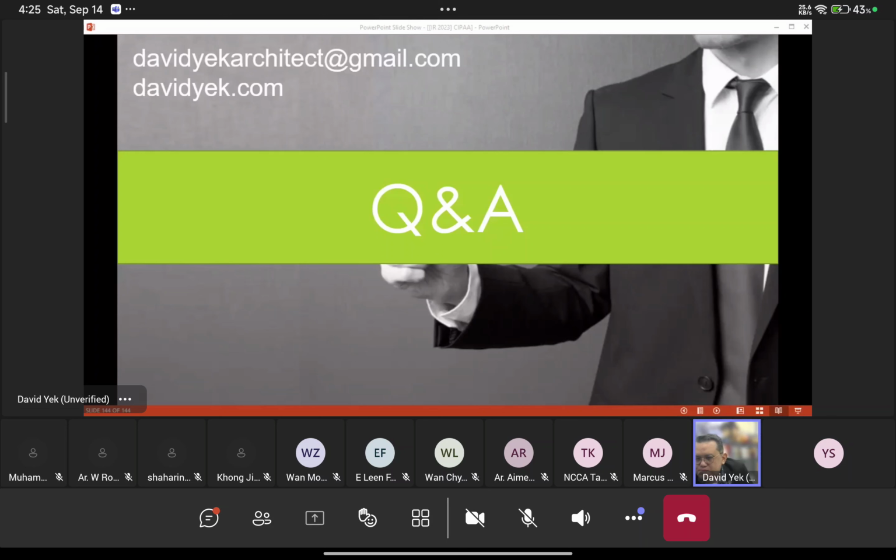Let's say a project of shop houses, landed houses with 2 stories is not under scope of SIPA. Yes, because of the story, it has to be 4-story. Okay. And then okay, now this is very interesting. You have got the 4 conditions, right? These 4 conditions do not stand alone.